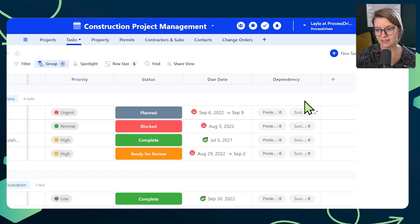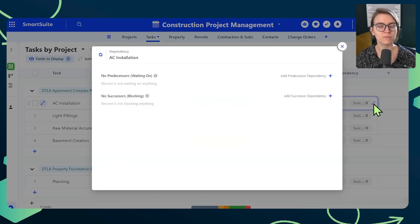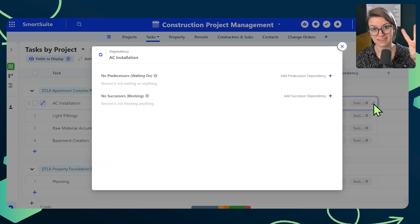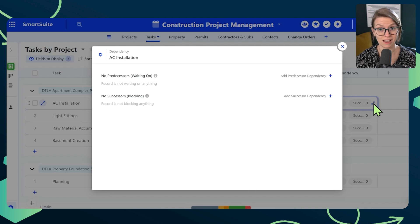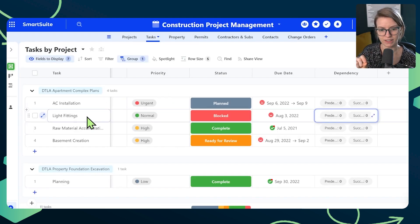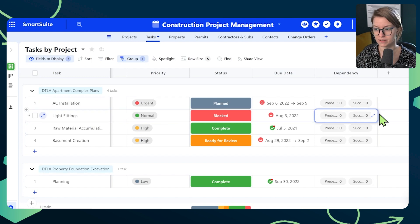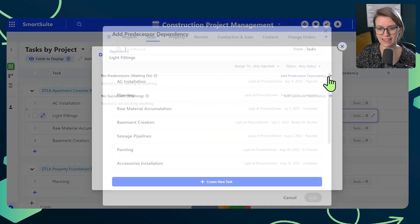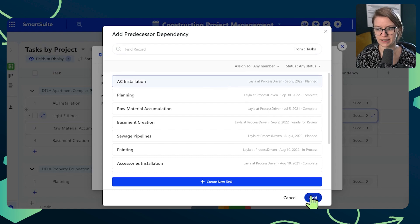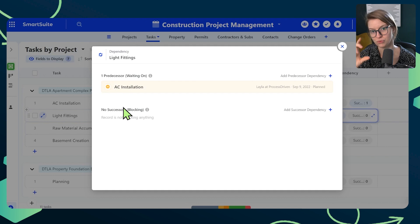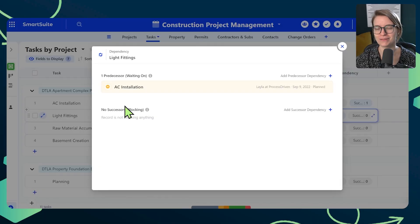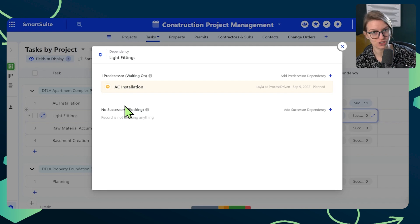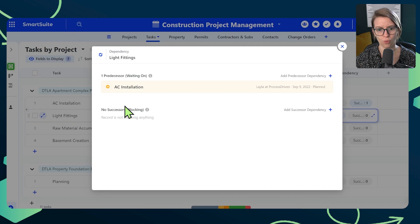To add this into your account, all you need to do is find the dependency field, give it whatever name you want, and click 'Add Field.' Once you add this field in, if we give it a click, you'll see it is broken down into predecessors and successors — in other words, what happens before and what happens after. For example, I could say 'lighting fittings' is something we can only do after 'AC installation' happens. I go to predecessors and say this is waiting on AC installation and click Add. By creating these relationships between things, we can better define the order of operations to make sure the project runs smoothly.